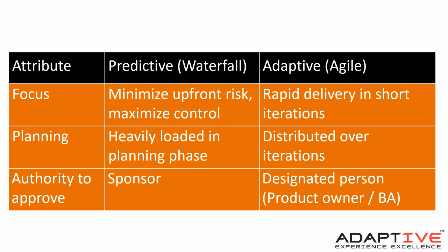When you're getting into the iterative implementation of features and capability and value, that you start delivering rapidly, and that you do the high level planning, but then you only do the detailed planning associated with those specific elements in that sprint or in that release that you're planning, while keeping in mind the big picture the whole time.